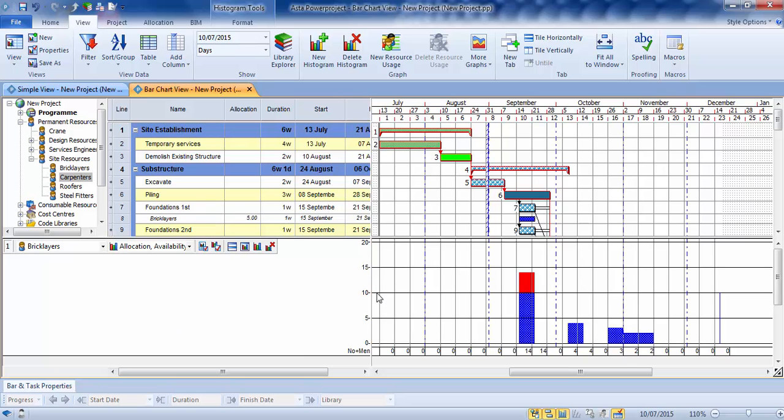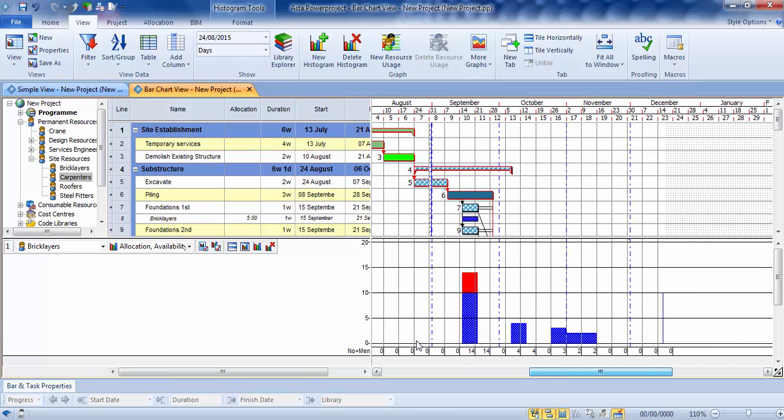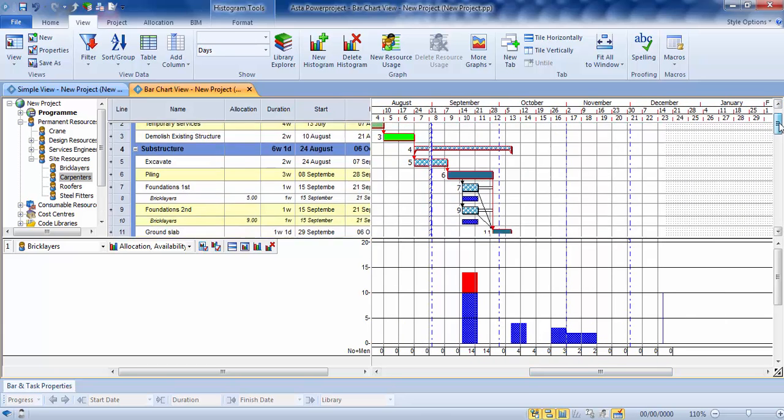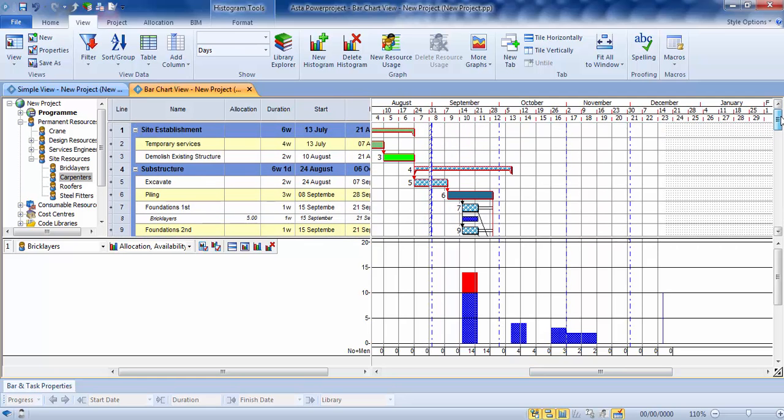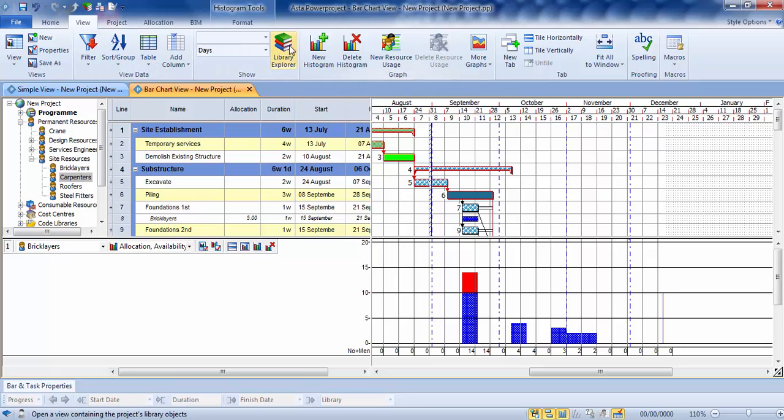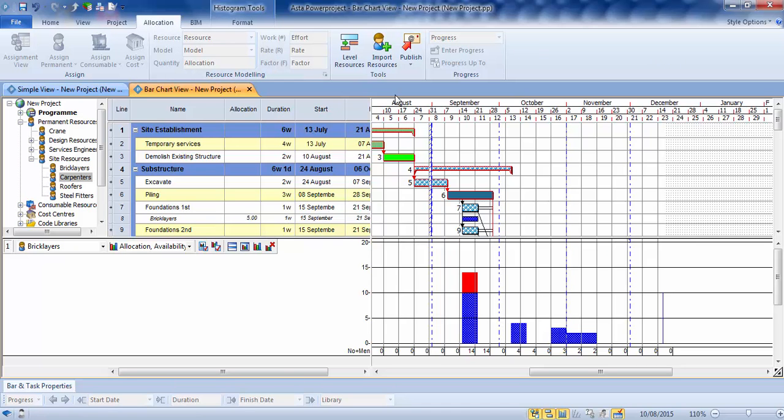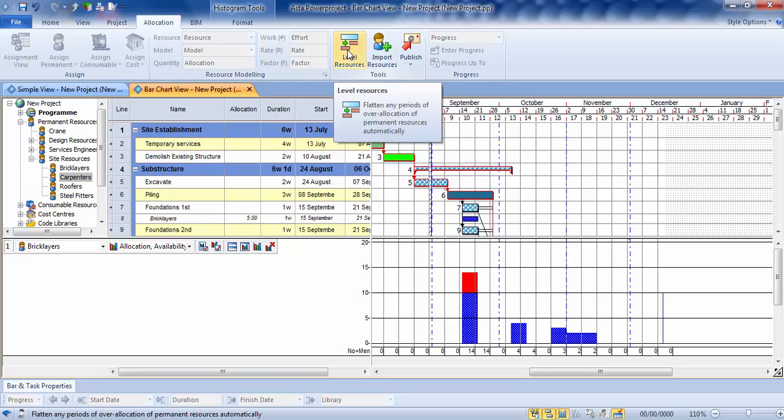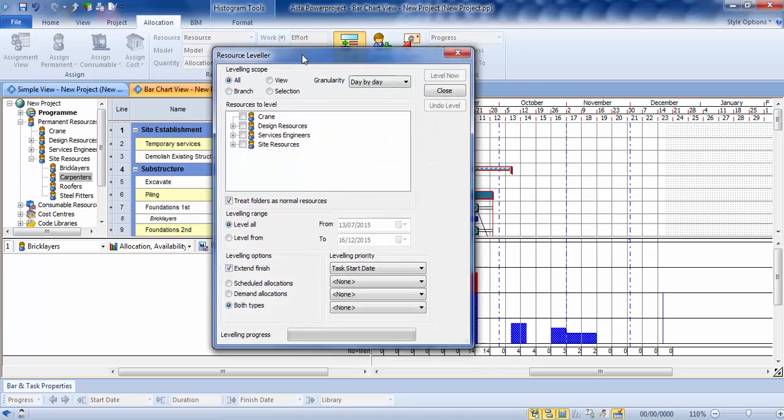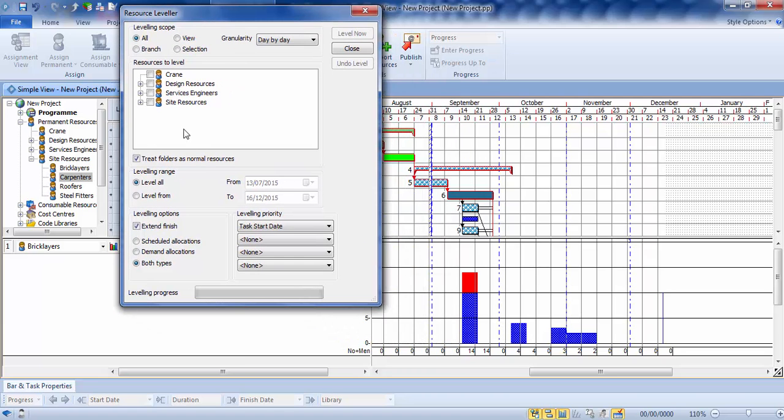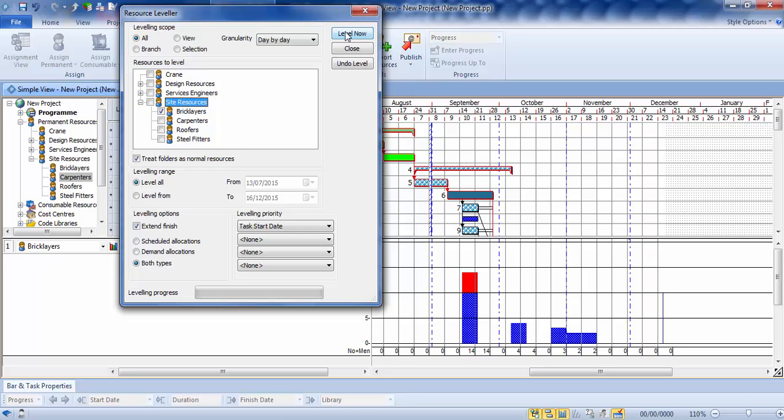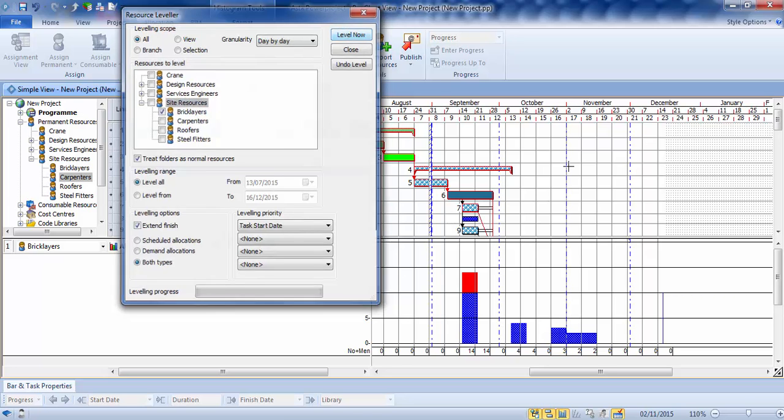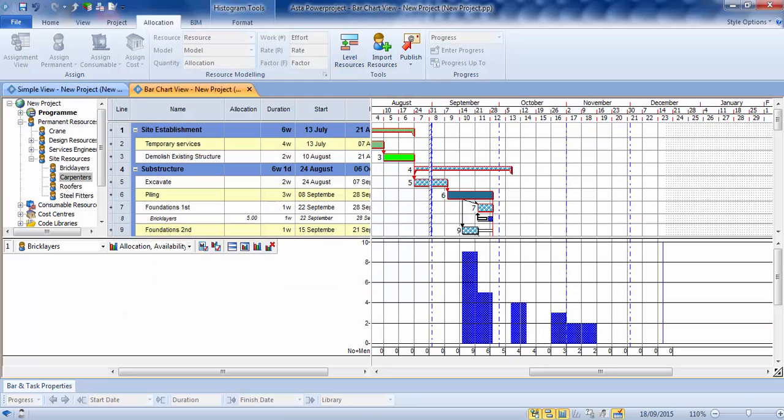Now I've already set this as a 10 maximum amount of bricklayers that I've got. So I can now see a graph showing just how many bricklayers are being used currently. You can now do various different things, which you would find on a training course as to modeling and what have you. One of the things you could do is on the view tab here, on the allocation, beg your pardon, we can get into level your resources. Now again, there's lots of different settings you can choose inside here. It's not a case that we're going to go through those today. But we'll go in here, we'll choose bricklayers, and we're just going to level that. Quite a simple example there. But as I said, there's various different settings you can go into as to what you want the project to do with your resource and your task. But just an example there.